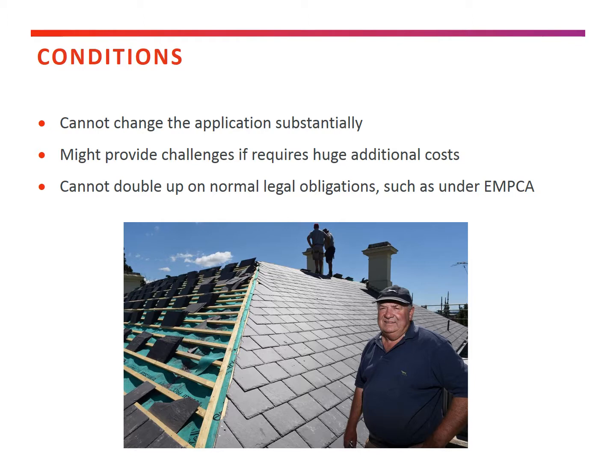It can't be a condition of the planning permit that you couldn't have dogs on site who might bark. That's something that would be dealt with as it arose through that different legislation. And so while council has a compliance role, that's a different part of council. It's not something that's part of the conditions that would go on a planning permit.